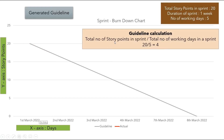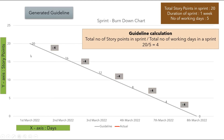The formula for the guideline is: total number of story points divided by total number of working days. In our case, that is 20 divided by 5, which equals 4. This means the guideline suggests that every day, the team has to burn down or complete 4 story points to successfully complete all user stories in the sprint, so that story points reach zero on the last day.